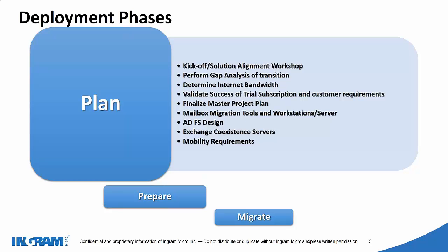recently we faced an issue with a customer that wanted to do the migration from Exchange 2007 to Office 365, and they were using Server 2003. On their Server 2003 they didn't have any Exchange admin panel configured on the public internet. In fact, they didn't have OWA or ECP configured at all. So all the migration tools, even Office 365, were not able to discover their Exchange solution. So the only option left for them was to upload the PSTs to Office 365.